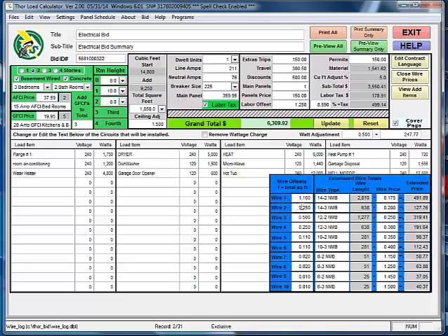But if you, on the other hand, find that you use less of this wire, then let's say you go 0.9, update, now the price is reflected here. So you just simply need to calculate what percentage of the total square footage of the house times the wire price for the total foot requirement of each of the wires.